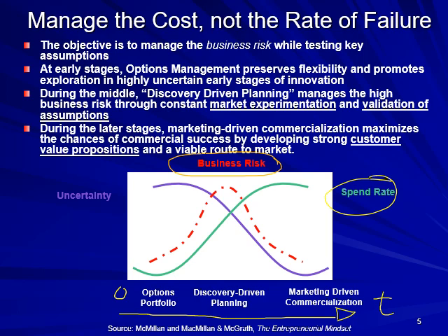If you have a lot of uncertainty and the investment small, the risk is still low, right? So in the beginning, even though we barely know anything, risk is low because we are spending so little money, okay? But as we're spending more money, even though uncertainty is dropping, risk is going up. You can see risk is the highest right here in the middle. Okay, because at that point we have spent quite a bit and we still have reasonably high uncertainty, at least